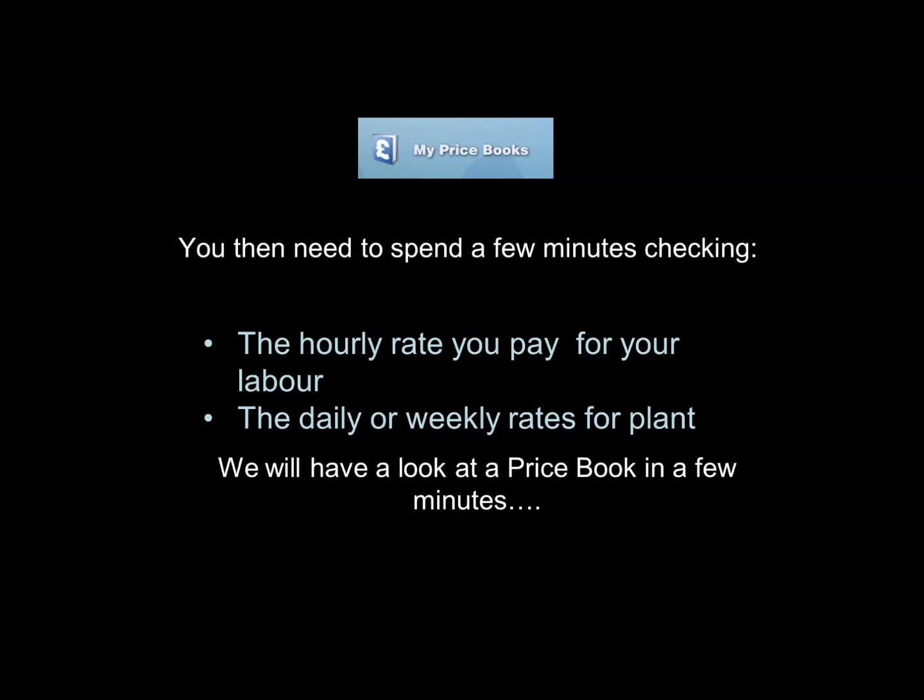Once you've downloaded the prices, which incidentally will come down into the software with your discounts, you then need to spend a few minutes setting the hourly rates for your labor. In this way, the software exactly reflects your cost structure. It's not some generalized regional pricing. It's the actual price that you're paying your guys to do the individual tasks.